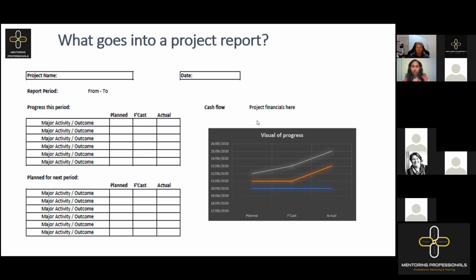So what do we want from risk and issues? Anything that needs to be highlighted or escalated to that level. So not day-to-day risks and issues, but anything that needs to be escalated. So if we are escalating major risks and issues, what is the problem with waiting with the progress report? It's not so much waiting, but it's just highlighting. So obviously you've discussed it during the last few weeks anyway, but as part of the report, you're just highlighting that these issues are still there, and what are you doing to mitigate it? Good, that's what we're looking for specifically.